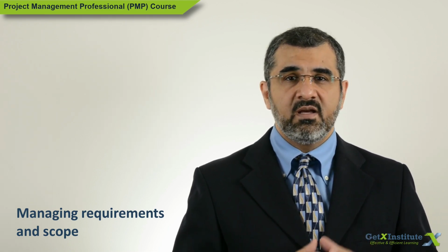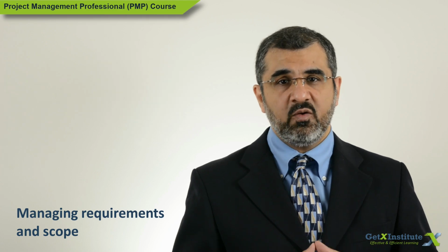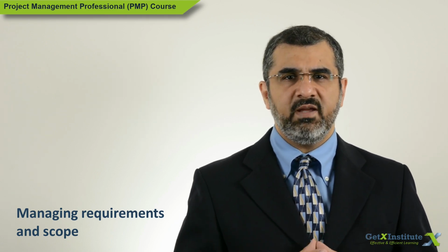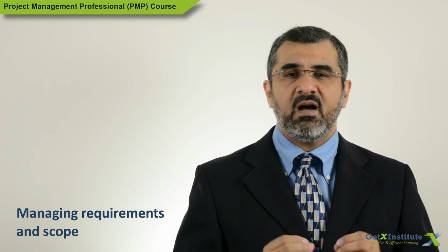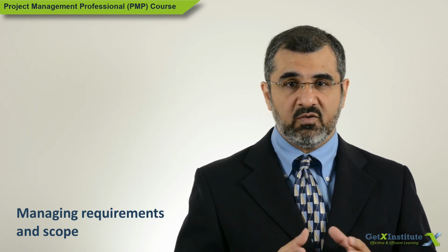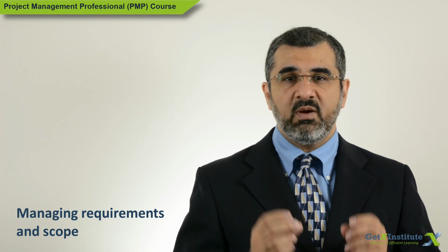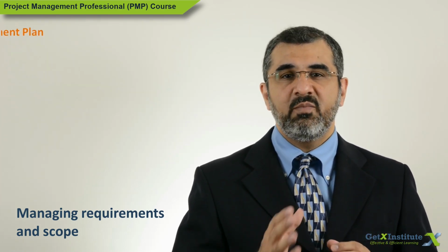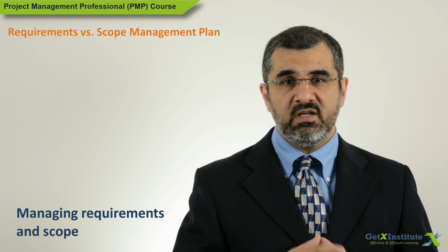These two plans address two different sets of activities. The difference between requirements and scope in a non-technical way is that requirements are the needs and wishes of the stakeholders, and scope is what the project team will do and deliver to meet those needs and wishes of the stakeholders.